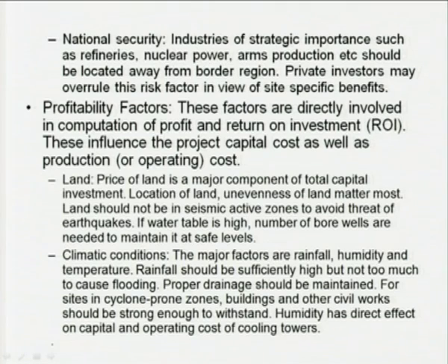You also have to take into consideration other risks such as earthquake seismic areas, okay. But these things are not given so much importance, because there have been examples of big projects coming up near sites having these kinds of natural threats. The example is that of the New Zealand Synthetic Fuels Corporation plant, which is designed to produce 14,500 barrels per day of gasoline, and it is located at the foot of volcanically active Mount Egmont. We have to take certain kinds of risks, although we try to reduce them as much as possible.